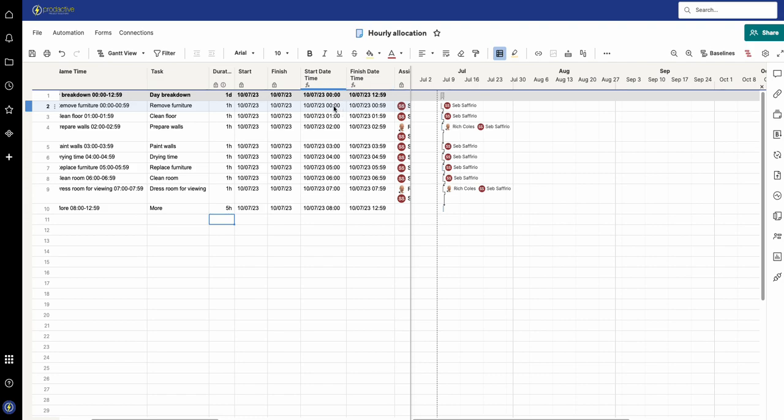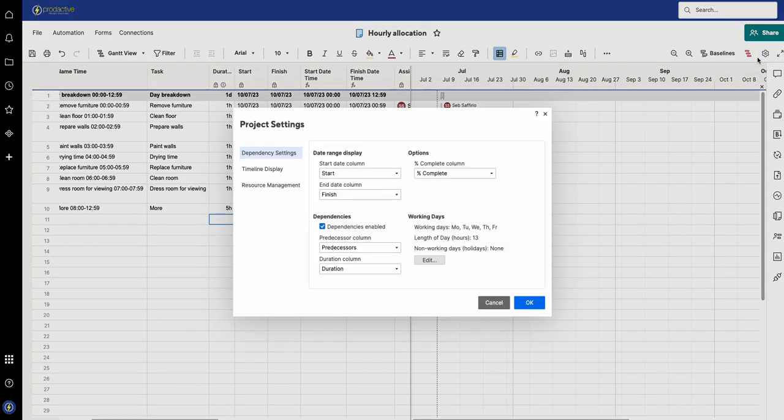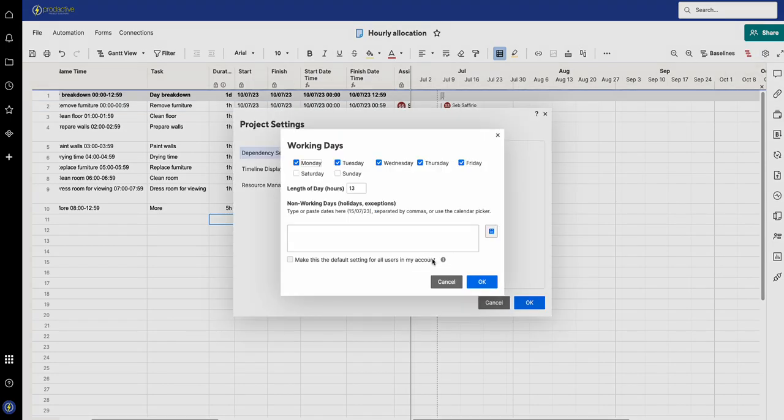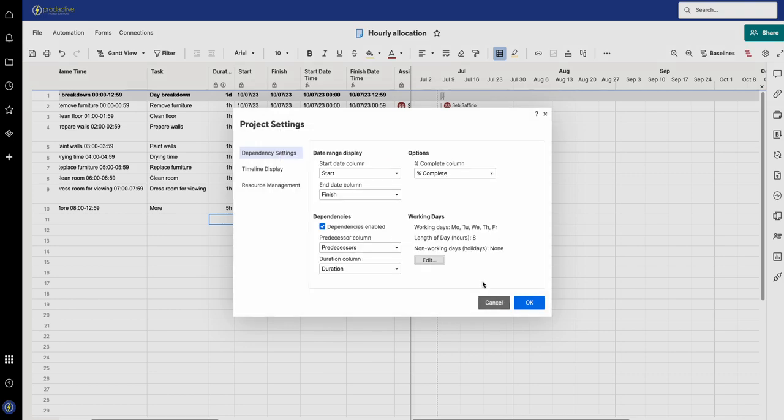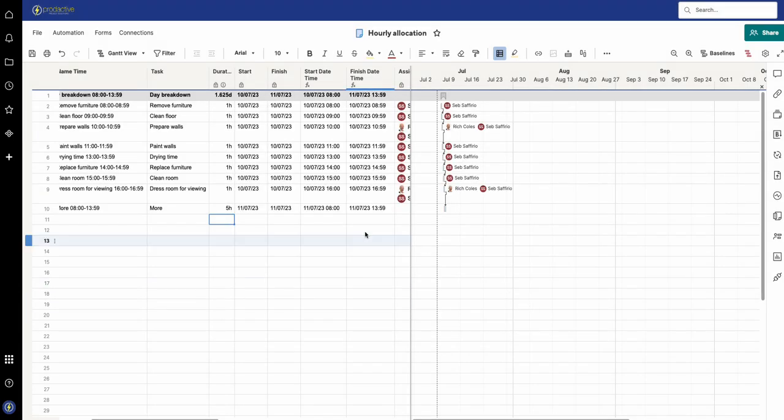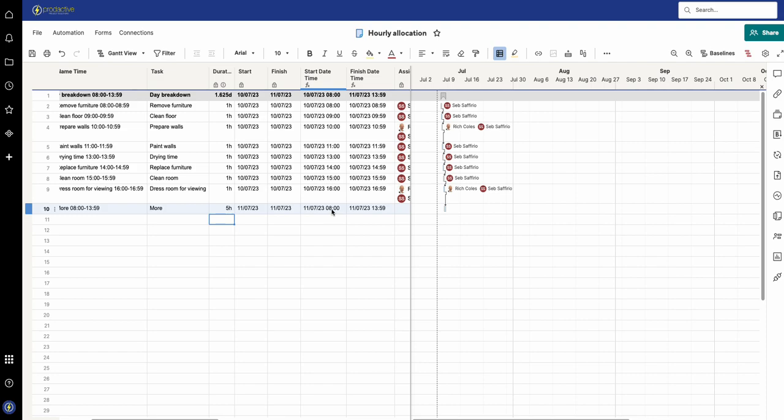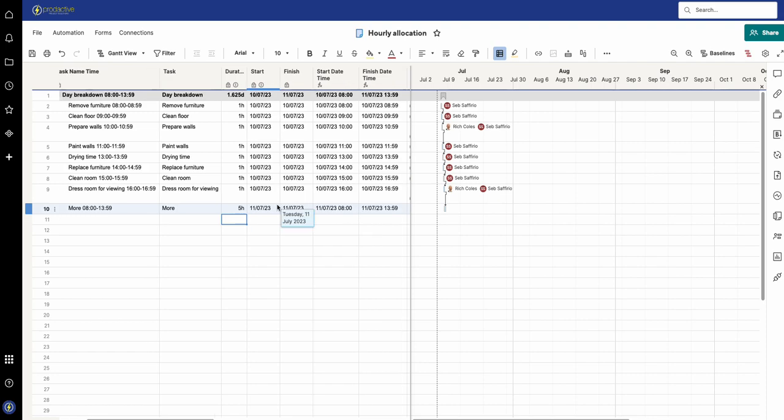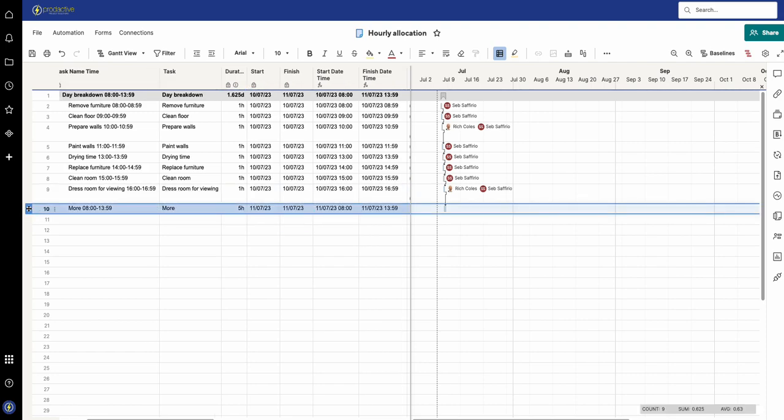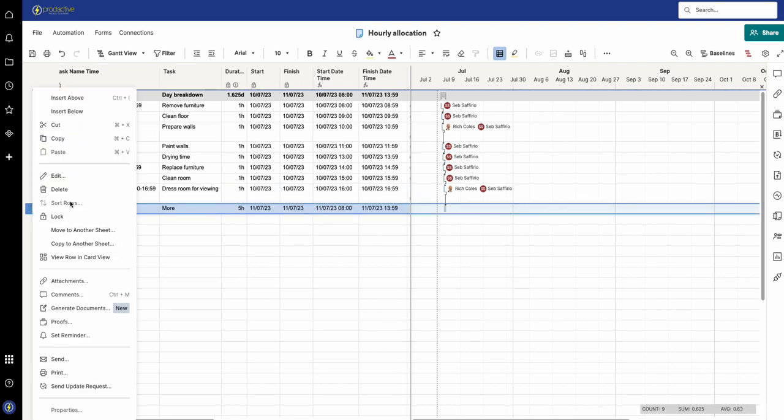If I just turn this now back to my standard working hours, which is an eight hour day, what's going to happen here is the time's going to spill over into the following day. You can see the timings are at eight. You've got a lunch break between 12 and one, non-working time, and then it rolls over into the following day. I'll just delete this last task out here.